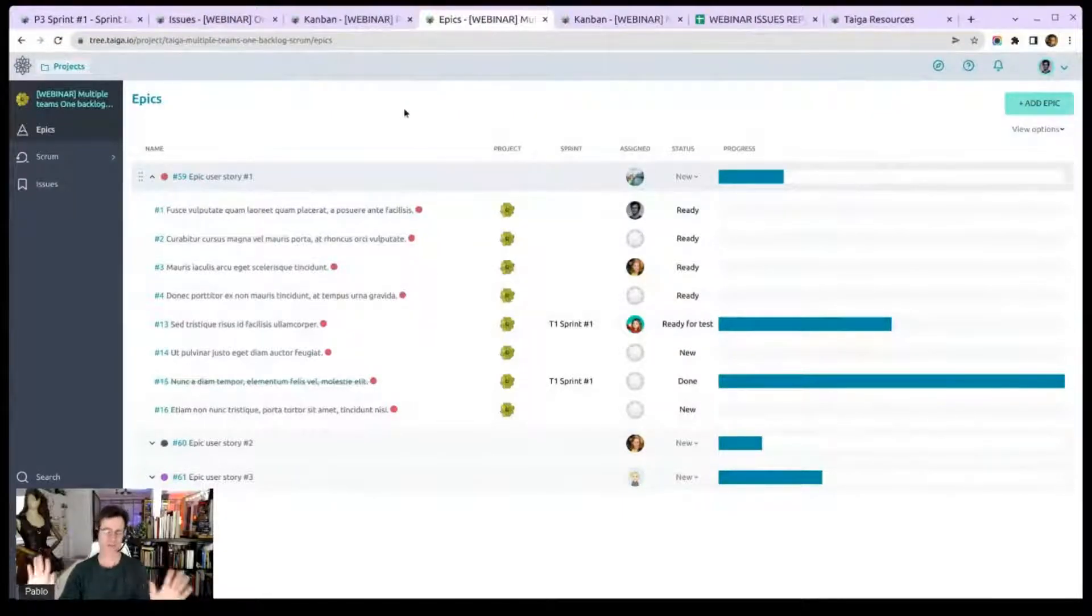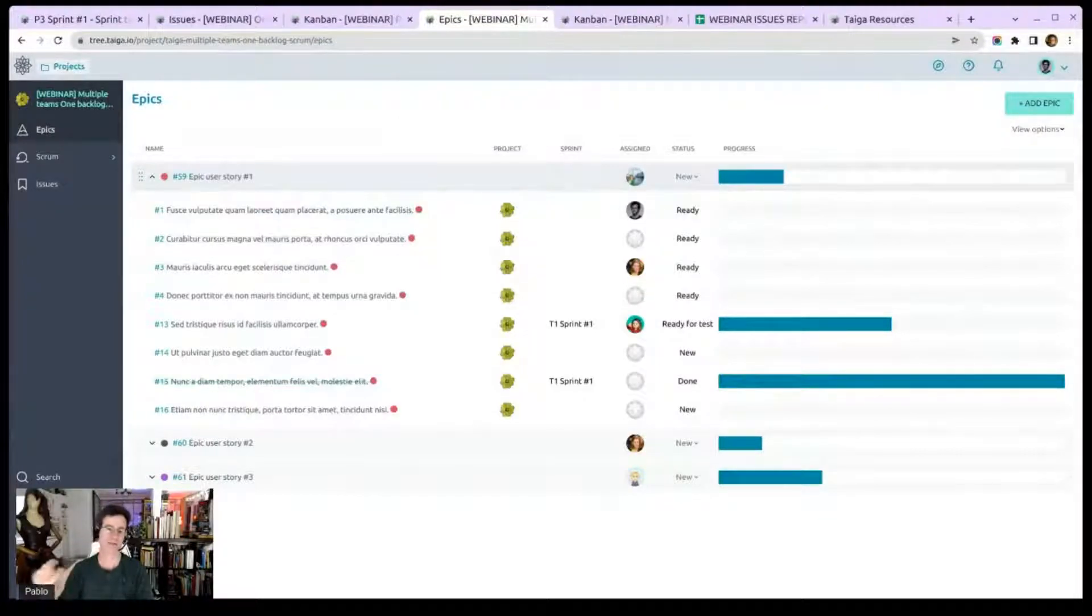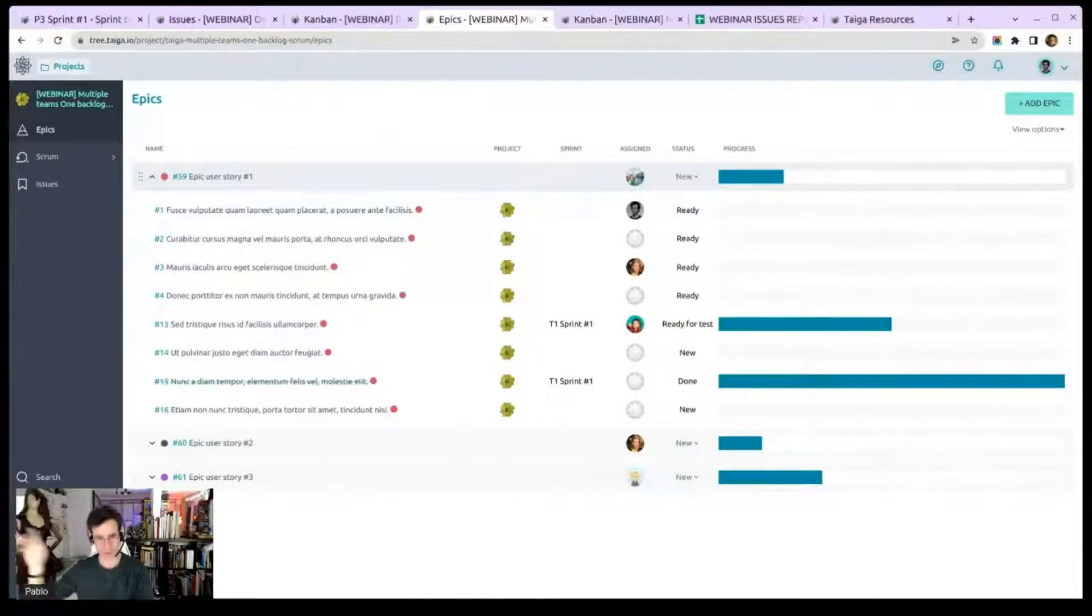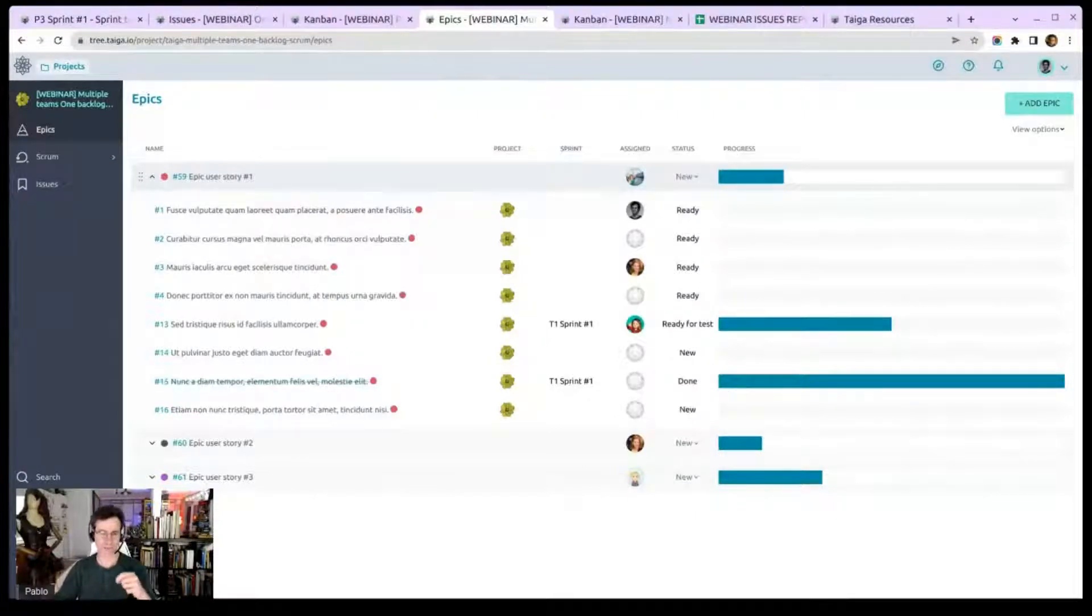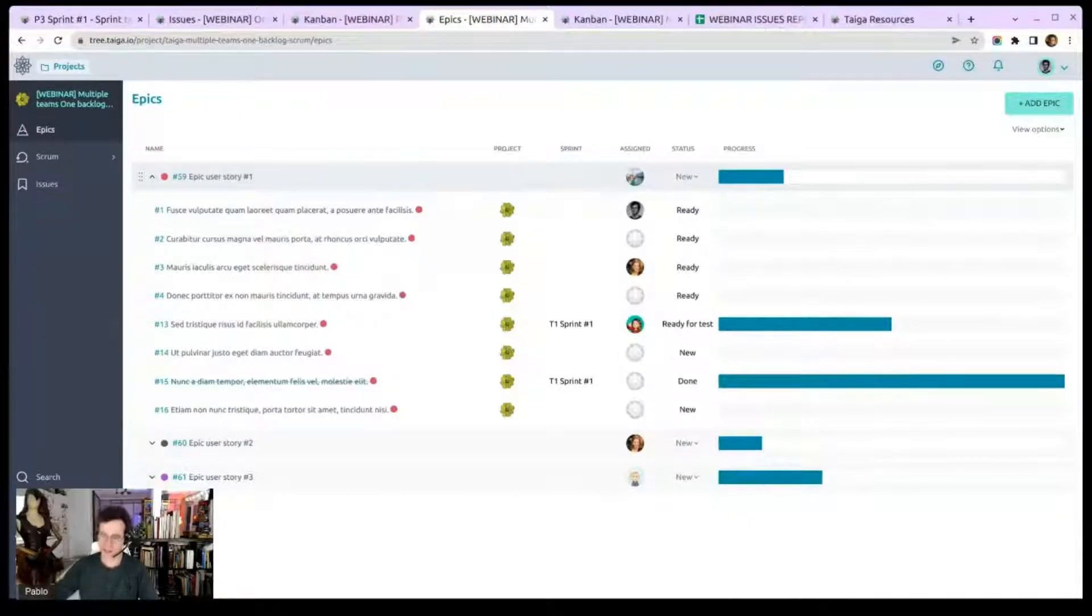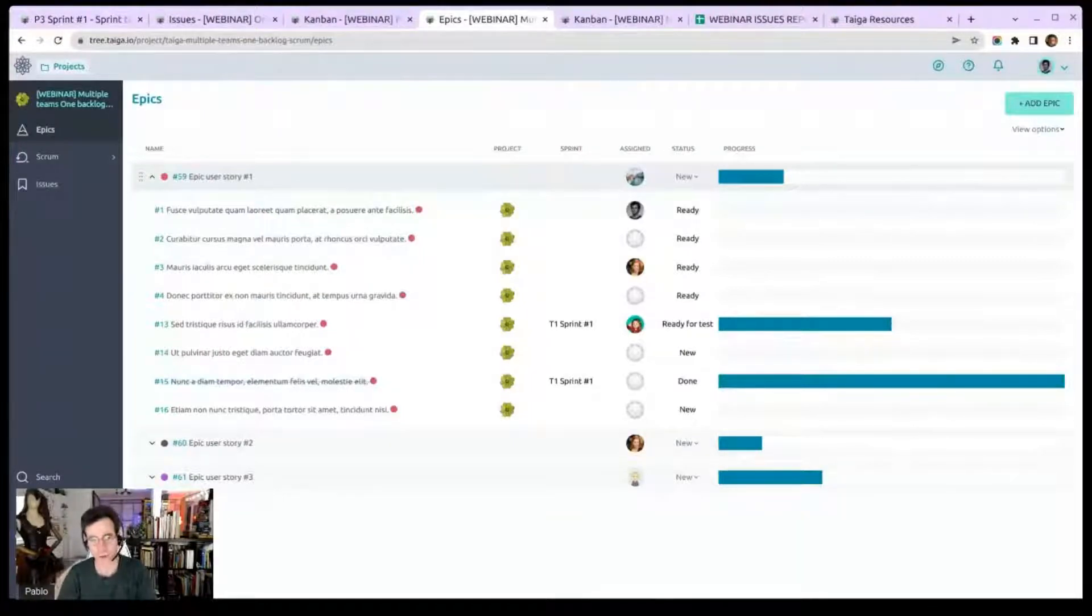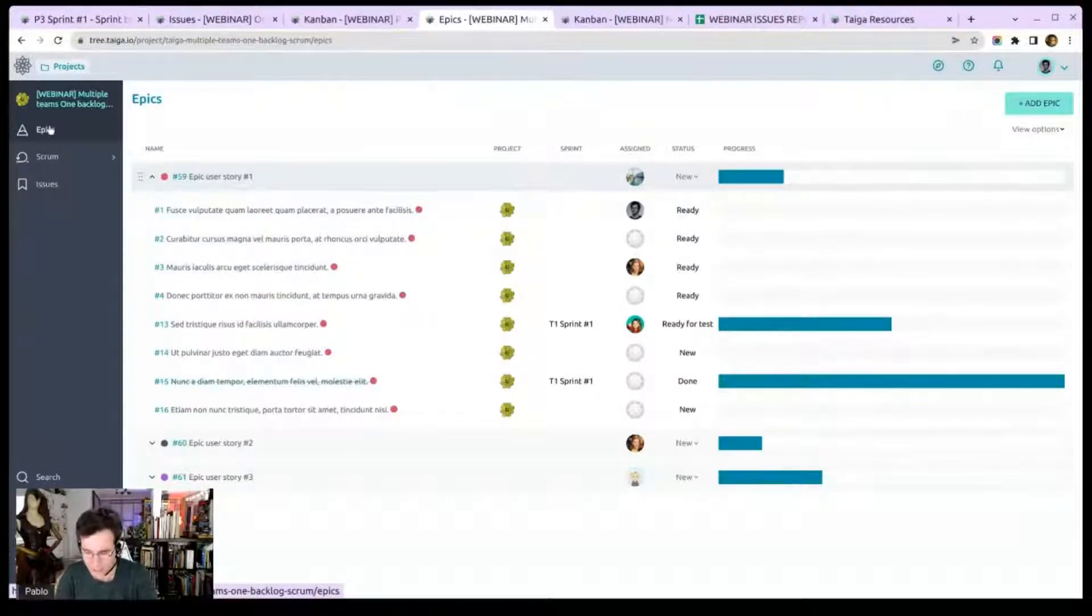By the way, the epics module in Taiga can be fed by user stories belonging to all the projects. So, you know, just in case you didn't know, we're using here epics within the same project, epics and user stories. But epics don't have that limitation. They can just take user story from other projects. And so you can see and track overall progress in just one project that keeps track of everything, right?